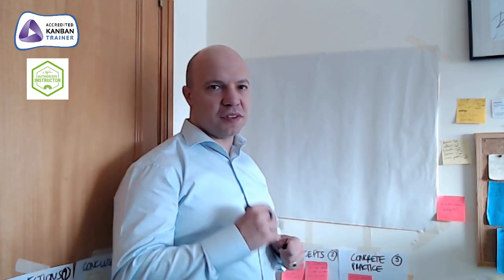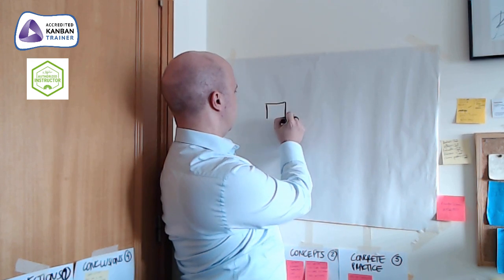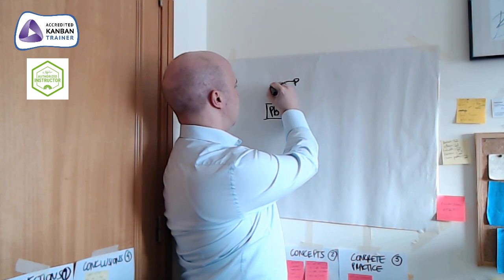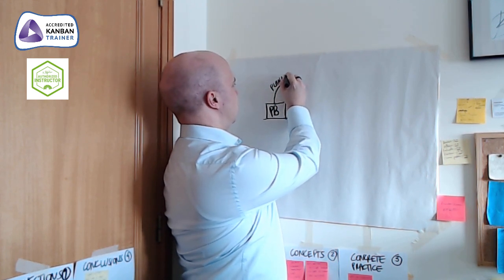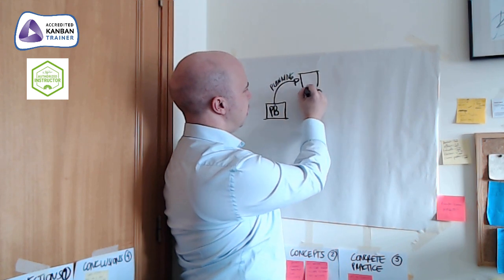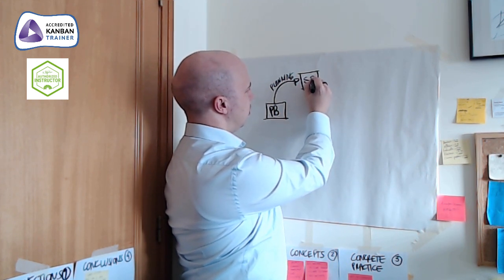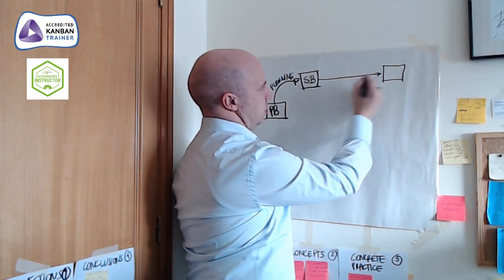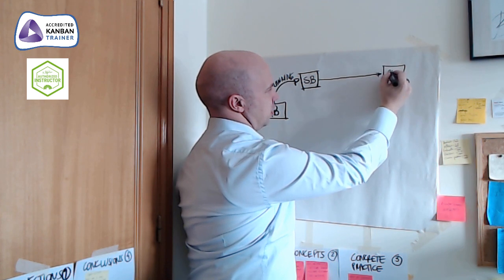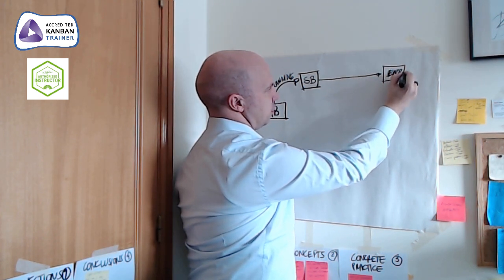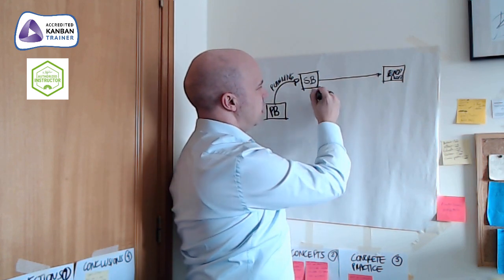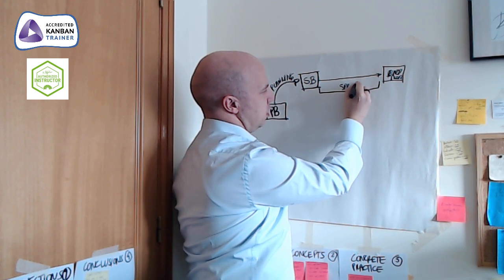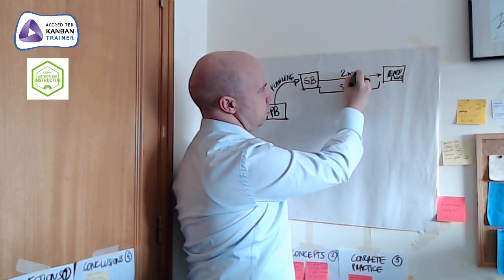Take into account Scrum, right? You have your product backlog, and then during the planning, the team is going to decide what is going to be the sprint backlog. And then here you have the incremental product in the end. We have this period of time, which is called the sprint, which most teams nowadays make 2 weeks, right?